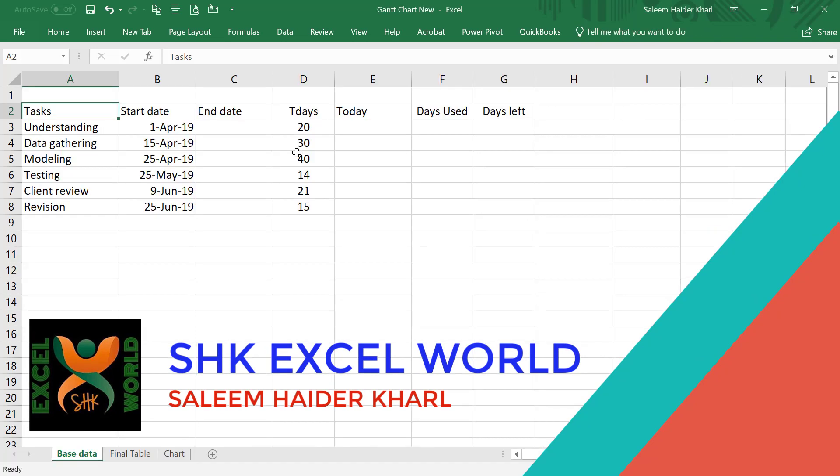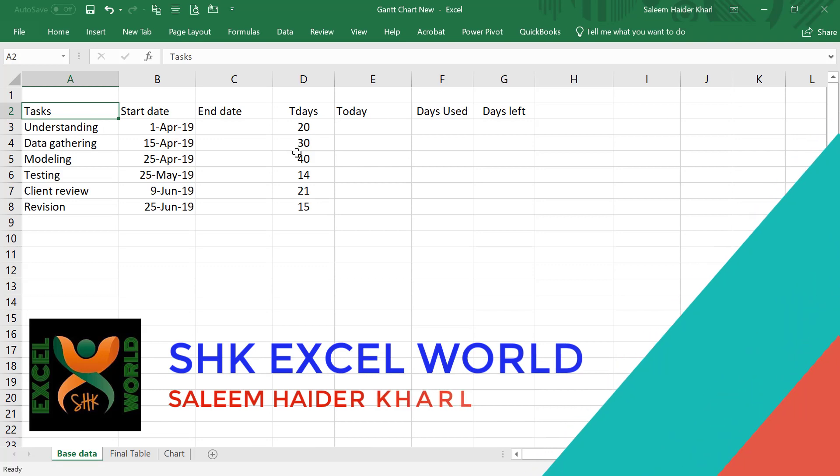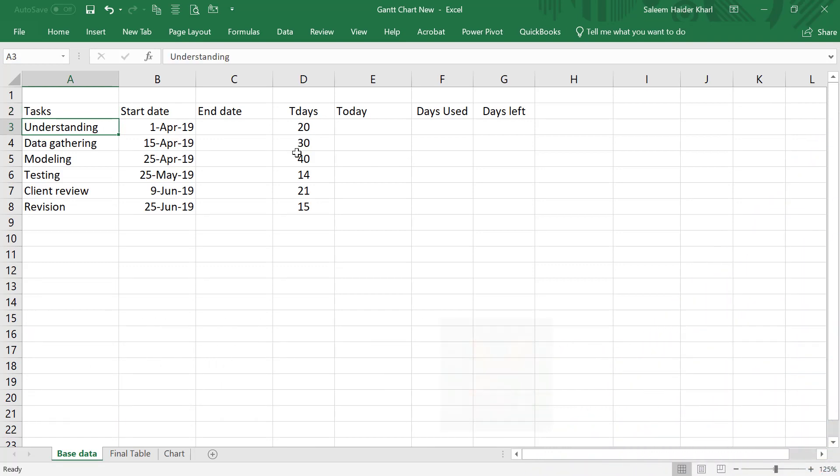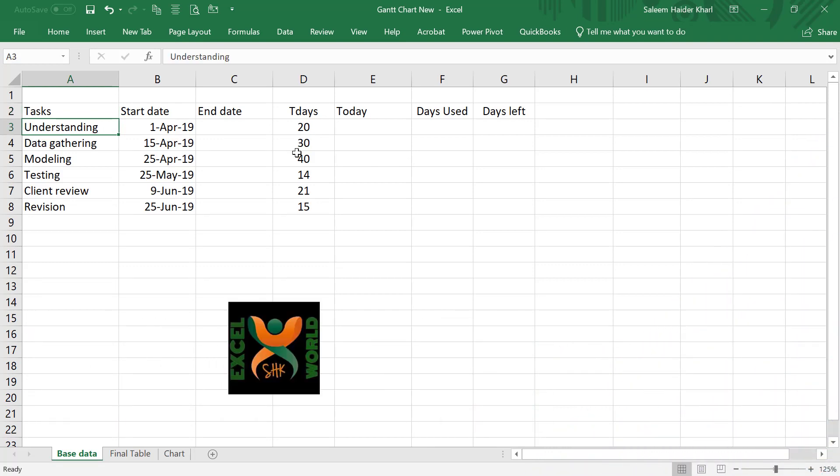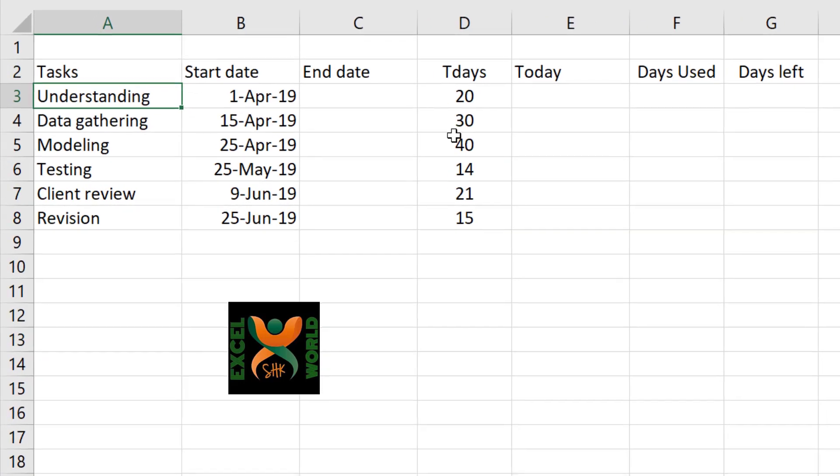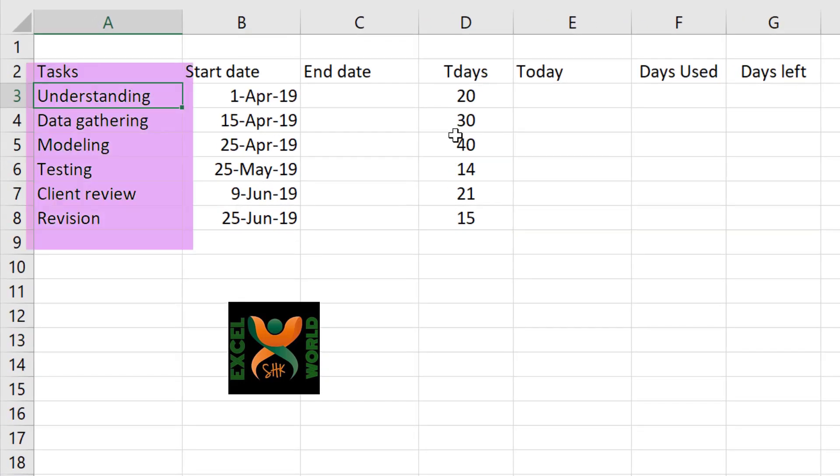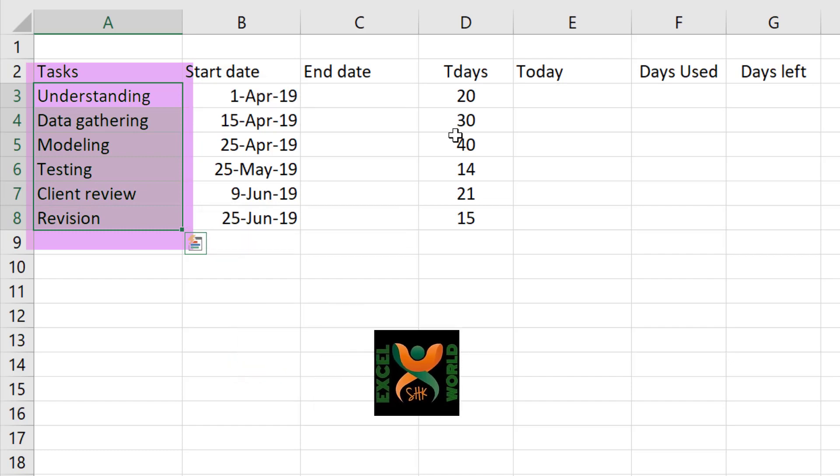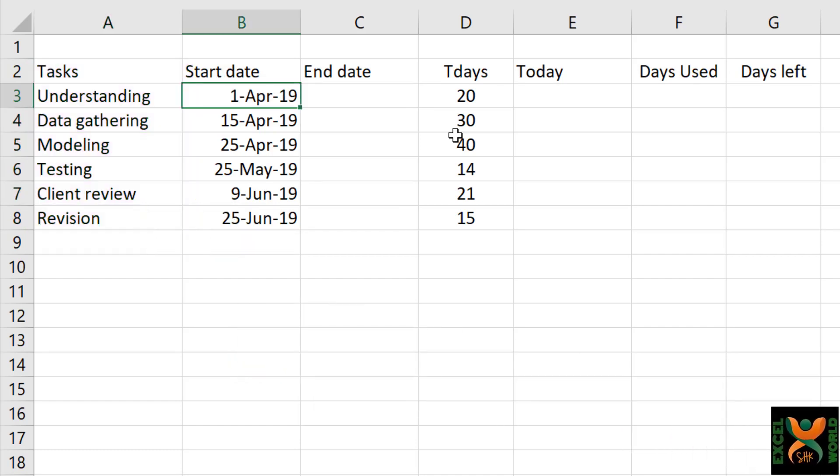For this particular exercise, we have a list of tasks available here. These tasks relate to preparation of a financial model or financial feasibility and include a total of six tasks. We have the start date and we have estimated the total number of days required to complete each of the tasks.